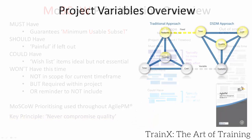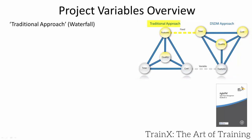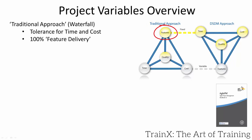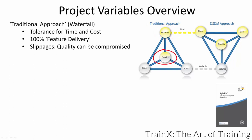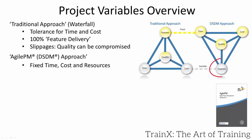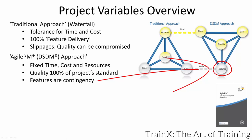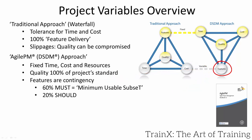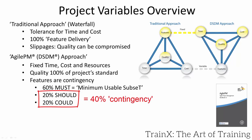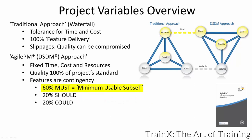All project management methods have triangular diagrams. A traditional approach delivers 100% of the features, even if some are minor, and uses tolerance for time and cost. In the event of project slippages, the separate quality testing stage can be rushed, leading to quality compromises. In the Agile PM approach, if we've done a good job with our estimates, we should be able to deliver all our musts, shoulds and coulds on time and on budget with known fixed resources. The quality of delivery will be 100% of the project's stated quality level. In the event of an issue affecting developer availability, the coulds can be de-scoped — and if necessary, the shoulds too — giving a 40% contingency while the musts still deliver the minimum usable subset.